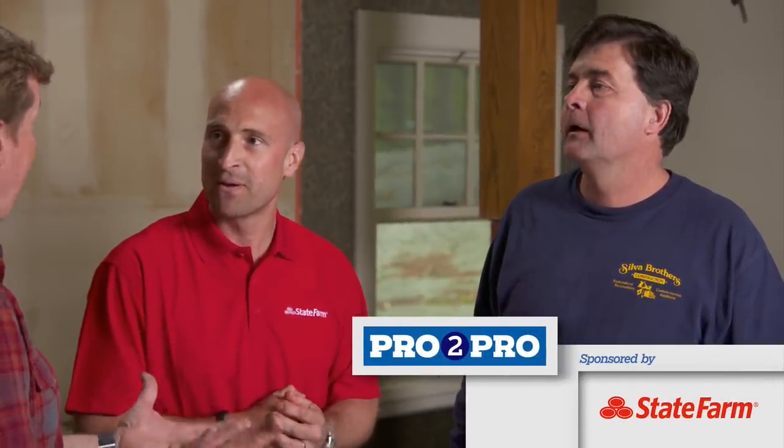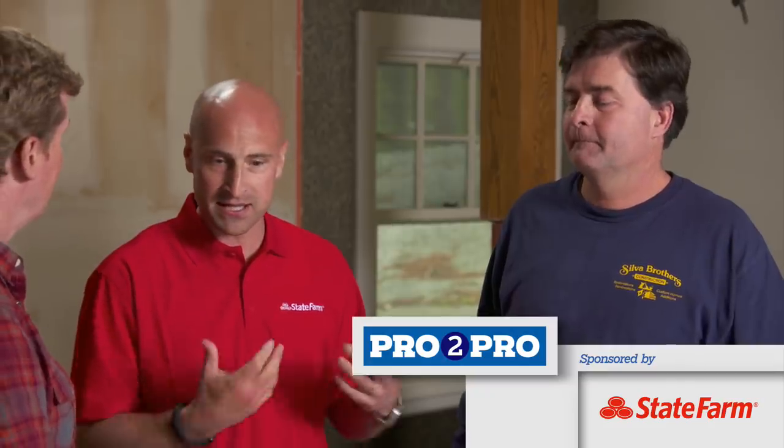What should I ask Charlie to produce to me? If I've hired him as a general contractor, the homeowner, what do I ask him for? I have no idea what to ask him. You just want to see a certificate of insurance. He's going to hand me a piece of paper that says that? 100%. Is it going to tell me an amount? Yeah, it's going to tell you the amount. It's going to tell you everything from their automobile coverage to their general liability coverage. If he has workers' comp, it's going to be listed on the certificate.